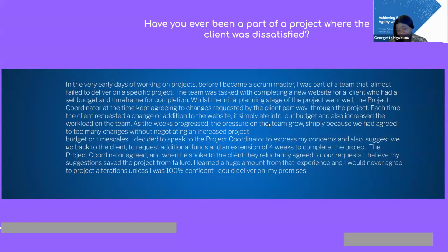What is happening here is, Agile requires you to change. But even though you change, it doesn't mean that it's going to take the budget. The way Agile works, you can change even at the last minute, but you focus on the one that gives the highest value. The waterfall way, when you change in the waterfall, it can impact the budget because they are expecting you to deliver everything you agreed to deliver on the contract. So every change has to go through a process, otherwise it won't be changed.